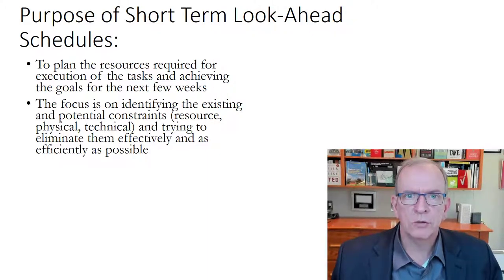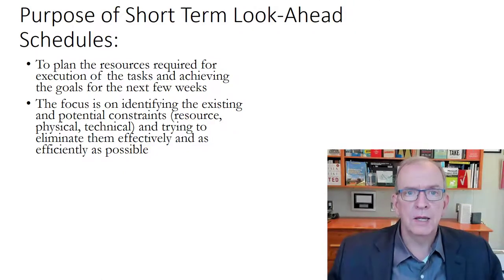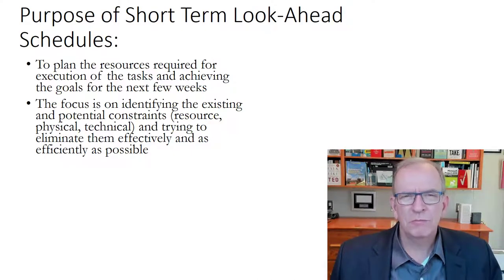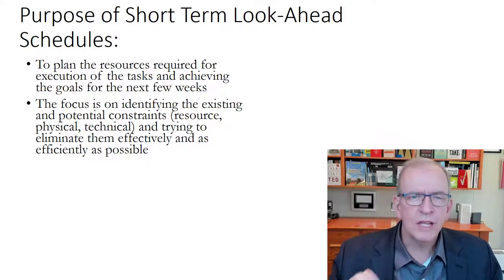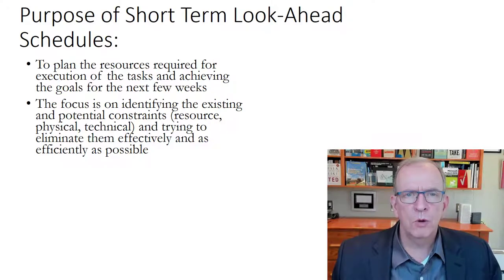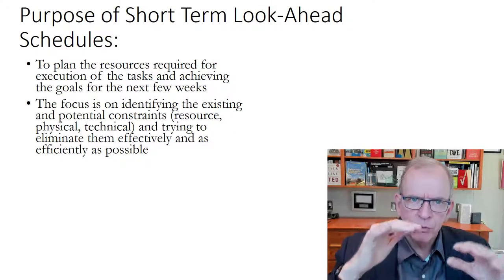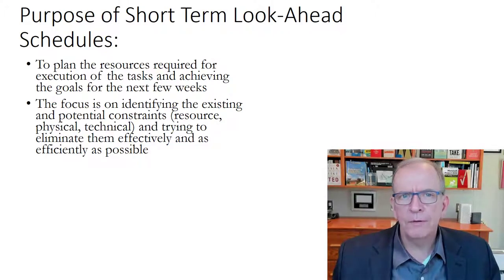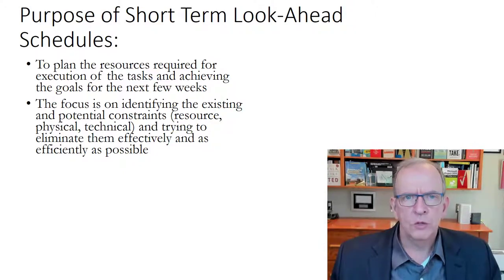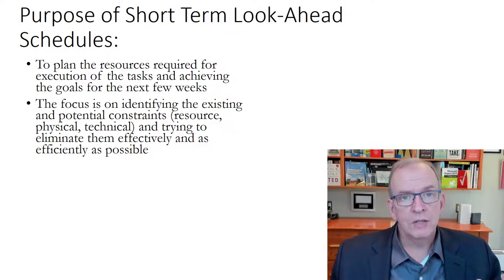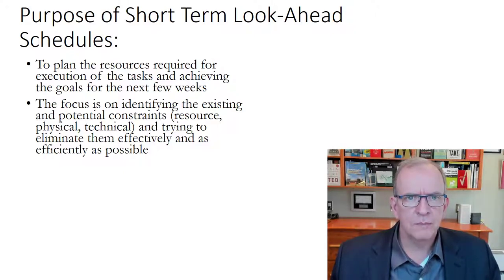Our short-term look-ahead schedules are fundamentally important for that, plus the fact that when we're doing our original baseline schedule we don't really know the nuanced details of how things are going to be executed. We're allocating activities, breaking it down, and figuring out time frames and durations based on historical data, experience, and hopefully consultations with the sub-trades — though very often in the traditional methodology we haven't even procured some of the sub-trades when we're developing that original baseline schedule.